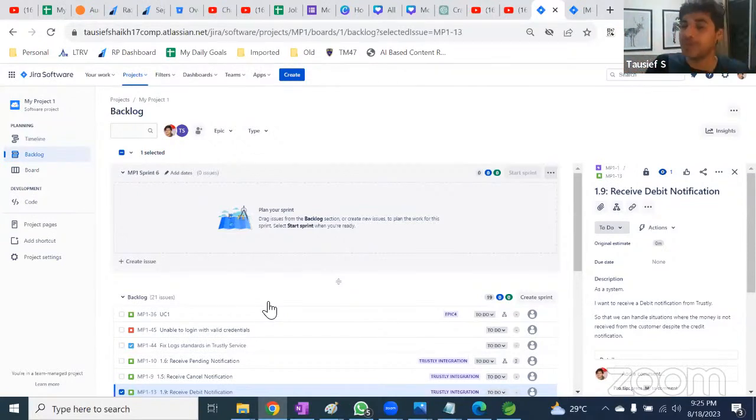Okay. Now, how many people do we have? Oh, in these 2 weeks, you're doing 2 weeks planning. In these 2 weeks, this person is going for a vacation for 1 week. So you have to consider that, oh, he's going on leave, so we have to take less work. Now, considering all of these things, and then considering uncertainty, what if we are stuck? Some buffer needs to be added. What if you are stuck somewhere? Something is complicated. You need to focus on this.